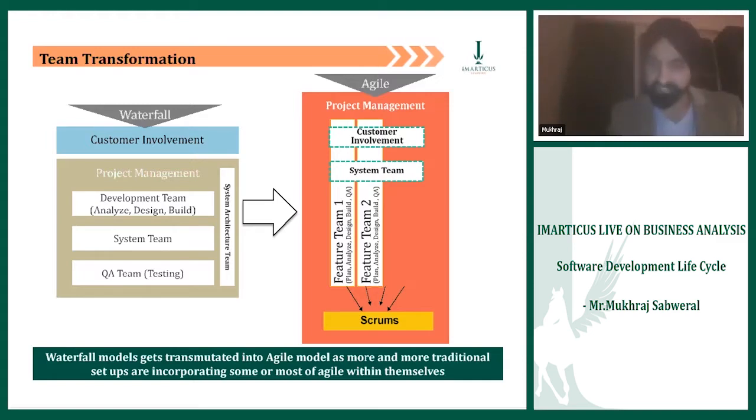Feature 1 was automating one component. Feature 2 was automating the second component. And that's how I built 5 teams of 10 people each. Gave them separate sets of requirements. Many requirements can be developed in parallel. So guys, I just reshaped 50 people into 5 teams of 10 each.